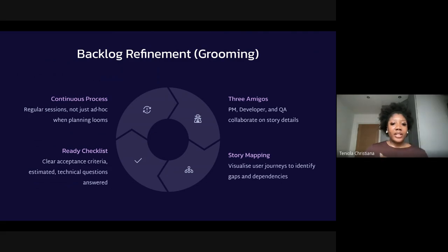You want to have clear acceptance criteria within that ticket, have an estimation around time, and that's why you need to have your developer and QA there, because together they'll be able to give you an estimate of how long it would actually take to complete that specific task, and make sure that the technical questions are answered.